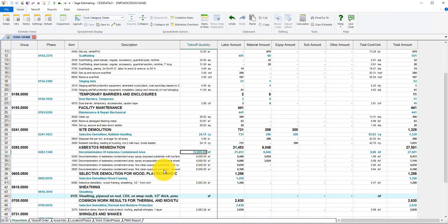Since these are different items, generally what we'd want to see here is a single 8,000 square feet, not an auto-calculation. So folks work around that by picking one unit and slightly changing. We'll go SQFT instead of SF. And if we change that unit, then we only calculate the 8,000 square feet that we want on that overline. So once again, it auto-calculates based on matching a corresponding unit that you choose. It's user-defined, and it does the math based on your definition.